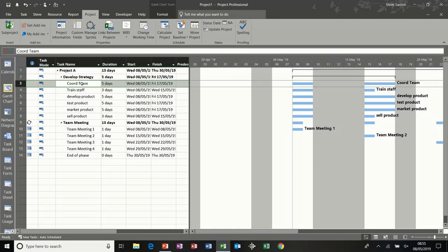Now I want to show you how to embed documents into these tasks. One of the conflicts you get in Microsoft Project is how much information to put in this task list. People like to put everything down there, so I tell people don't write War and Peace. You don't need a massive list. If you've got processes in place, where you may already have method statements that you are using, why change that by writing a whole thing in Microsoft Project? Embed the method statement in one of these tasks. People can read, and when they've done the method statement, they can update the task as being complete.